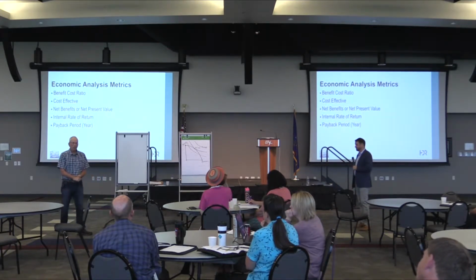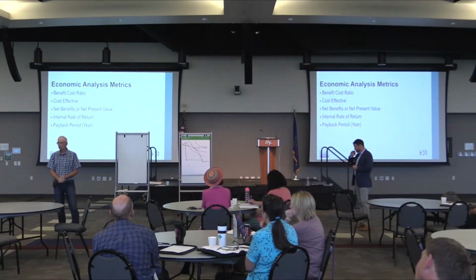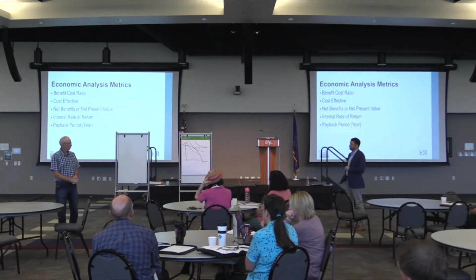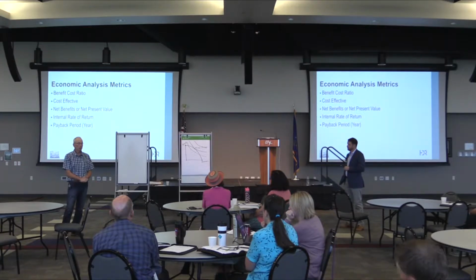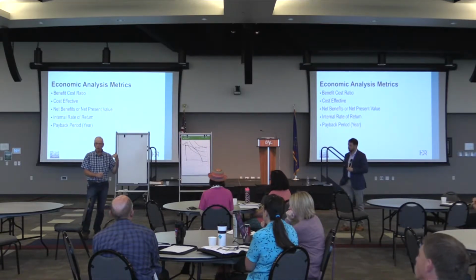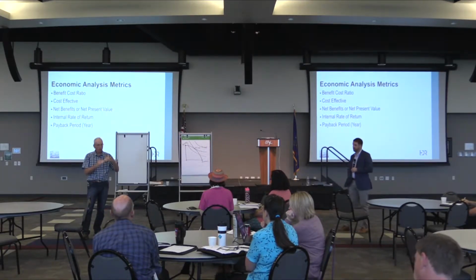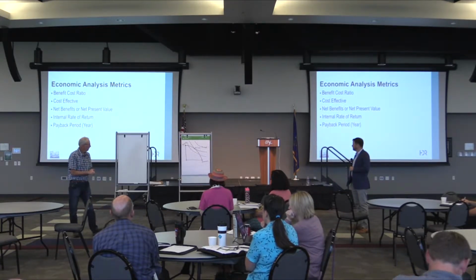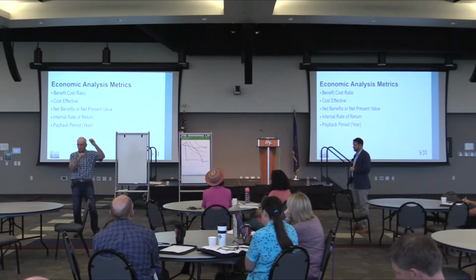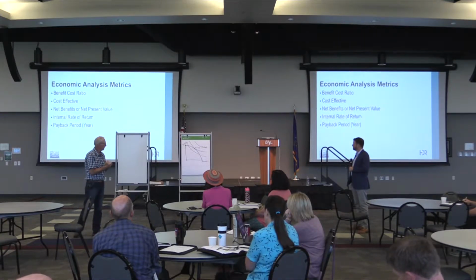There are many economic analysis metrics. The legislature didn't dictate. They just said economic analysis. Benefit cost ratio is certainly one that we'll talk a little bit about. Cost effective is just looking at, like we did this morning, LCCA. It's just looking at the cost side, finding the least costly way to accomplish the objective. That's cost effectiveness. Net benefits or present value is taking the present value of the benefits and subtracting the present value of the costs and seeing how much net your margin is.